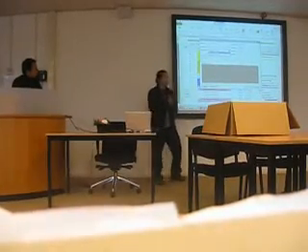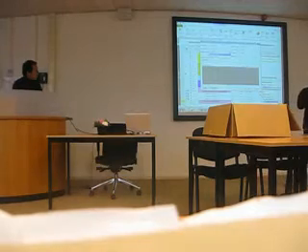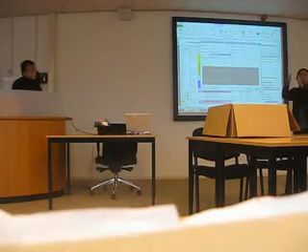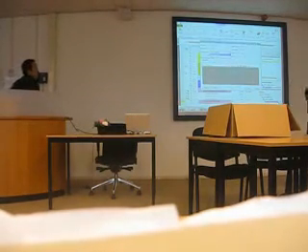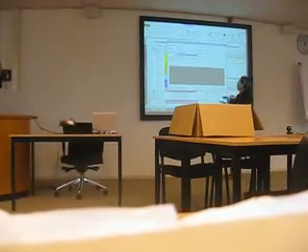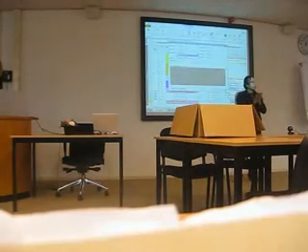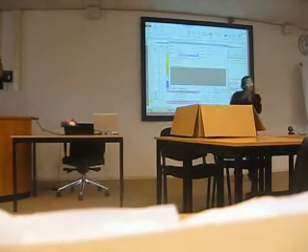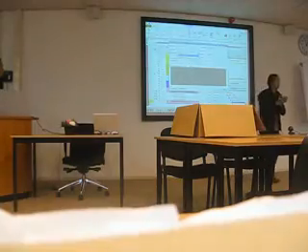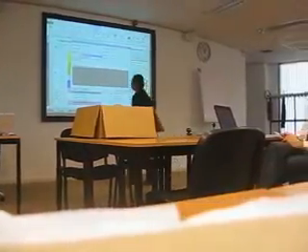If we determine the project finish date, which is the 1st of February, it means Microsoft will schedule backward from it. And if we decide on the start date, then Microsoft will do the scheduling after that starting date, forward. Okay, this is very important.